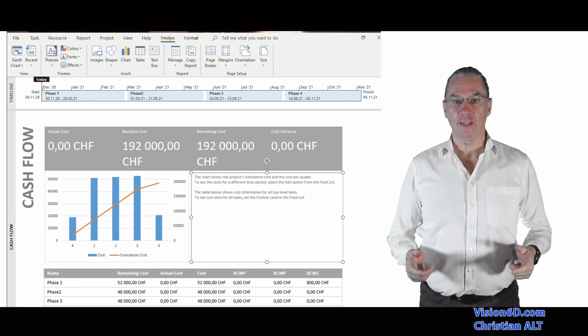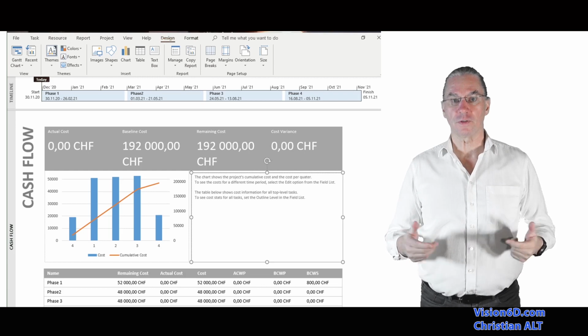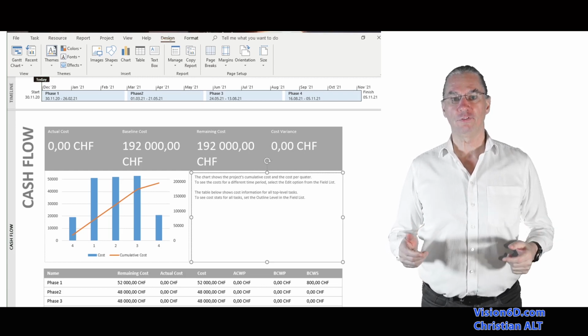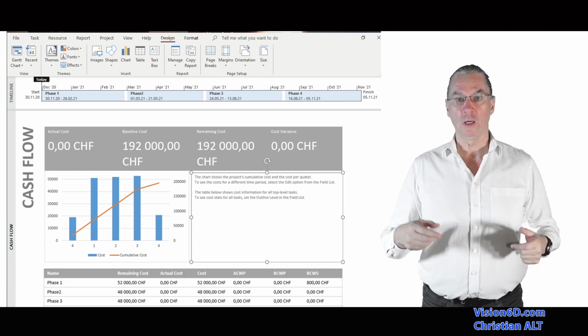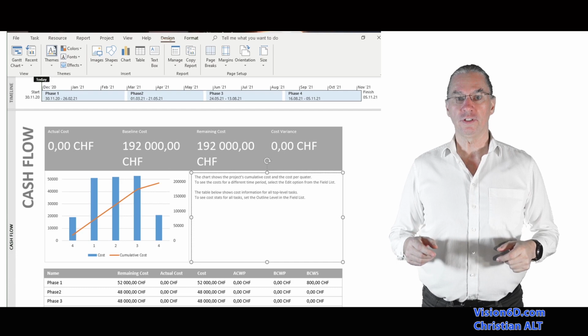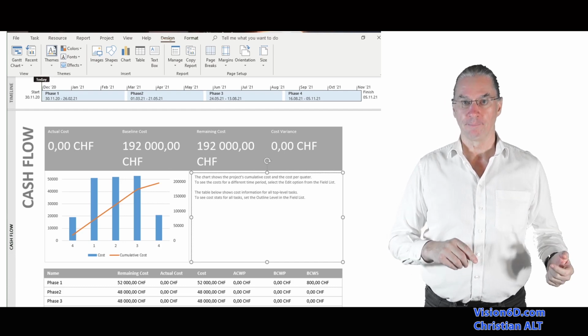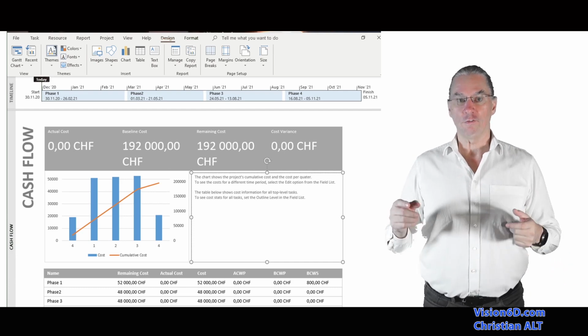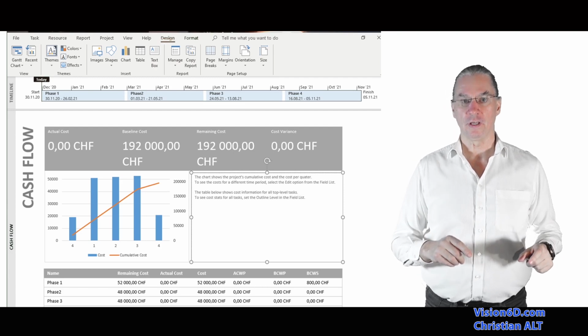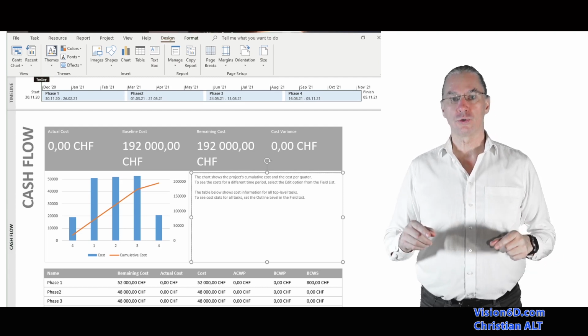Organizations plan their budget based on fiscal years. For this, it might be that long before we know the scope and the detailed scope of the project, there is already a budget that is approved. In that case, of course, the project has to adapt to the budget, and the baseline has also to adapt to that budget.